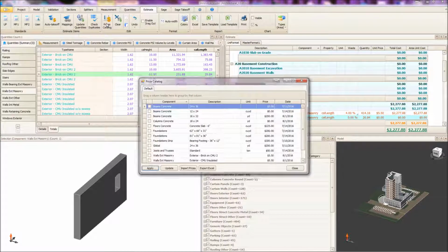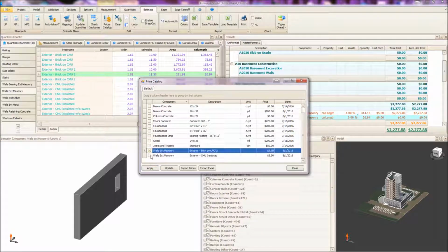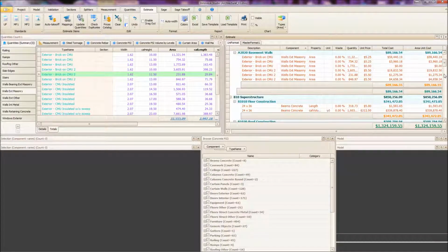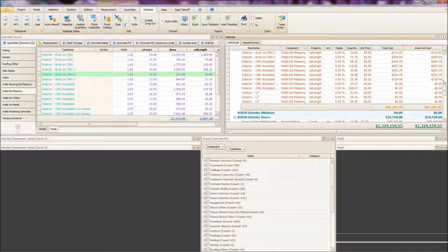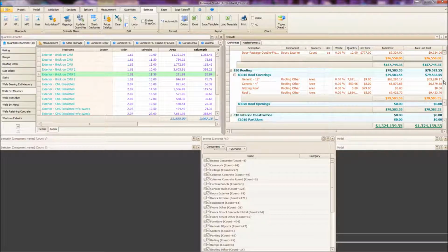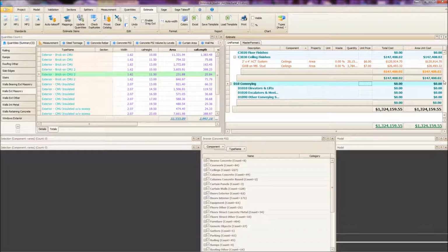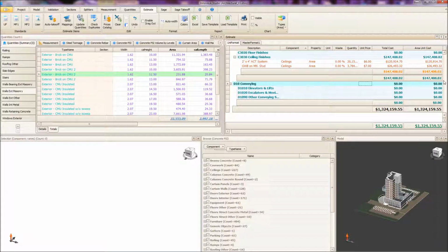From there, enter cost details in the estimate, or look up costs from a catalog of previous project costs. Innovaya Estimating will automatically remember which quantities go into which estimate groups, so the next time the user can automatically take BIM quantities to an estimate with the click of a button, no saving or exporting needed. And for design changes, after a model has changed, Innovaya will automatically update the estimate.